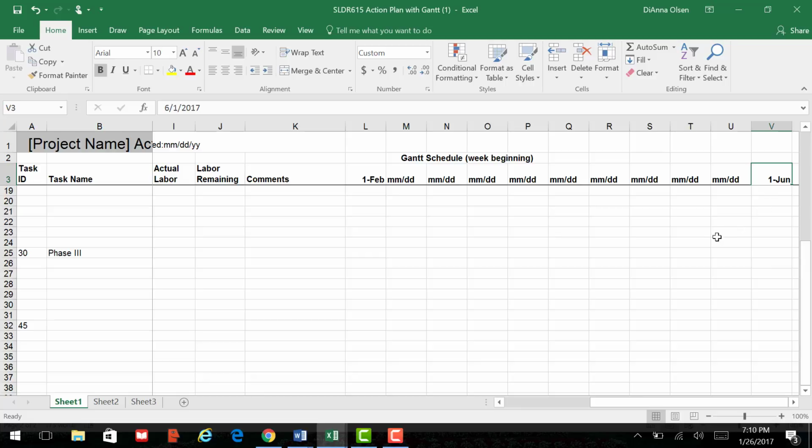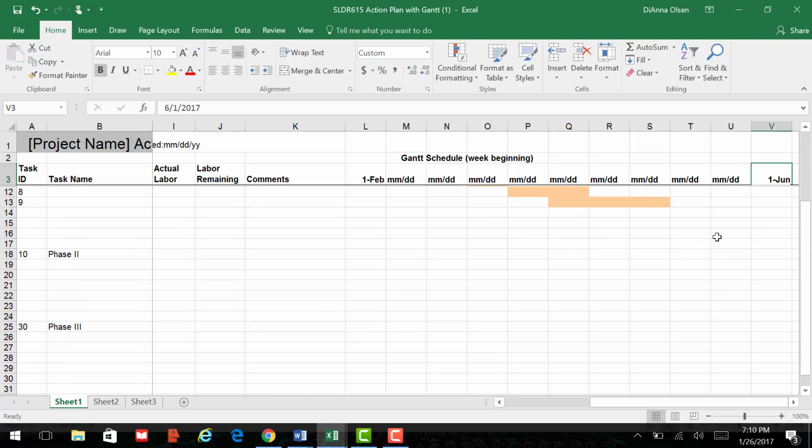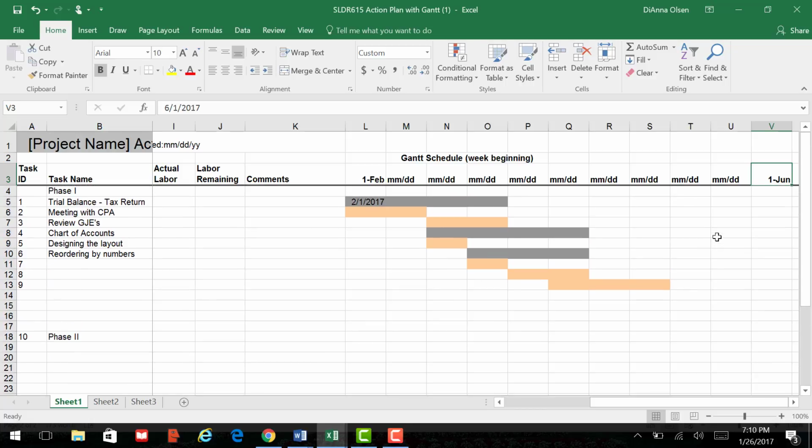And so it's really important that you take the time to do this, or else you will never be able to come in on time in your project because you haven't taken the time to break out each individual step. Sounds laborious, but after you have done this, it gives you a realistic schedule that you can count on. Will things change? Yeah. And will we need to probably put some buffers in? Yes. But this gives you your critical path.